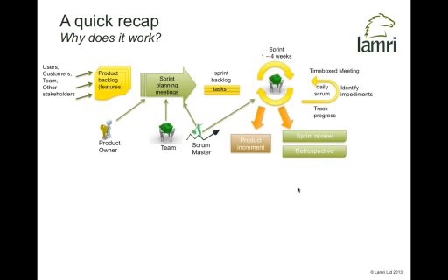And what's a sprint? It's a very short little batch of development work. It's taking some user features, some stuff off the backlog, and expanding them just in time, having those discussions with the users to say, what do we actually mean by this? And more importantly, how do we know when we have done it? So what's the test criteria? How are we actually going to test this particular feature?